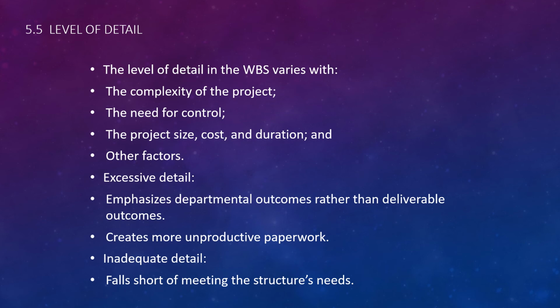Other factors: if there's excessive detail, it may emphasize departmental outcomes rather than deliverable outcomes and create unproductive paperwork. So the more detail you have, maybe it's just too much and we're just in it for creating work. With inadequate detail, we might fall short of meeting the structure's needs. So really there's this balance. We don't want to have too much detail.